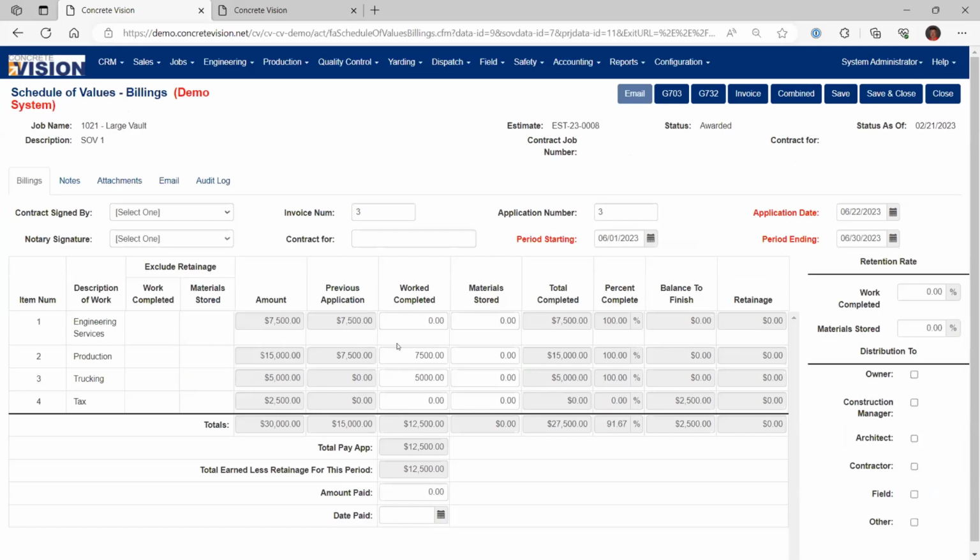Within each of the line items, it's not going to automatically compute that. Right now on the current system, we wouldn't know that this line is referring to tax. We would also then need to know the rate for the tax, and sometimes there's multiple taxing districts and stuff like that. And so on the current version and on phase 2, if you're going to do line item tax, that would just have to be manually calculated and entered into the system. Thank you.